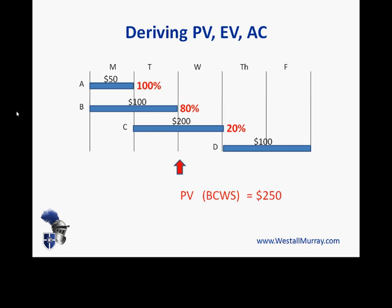Now let's say that, as a result of a progress report, we're told when we get to Tuesday this is what has actually happened. Activity A is indeed 100% complete, but we've only done 80% of Activity B, and only 20% of Activity C. So let's think about our Earned Value. We've completed Activity A, so we've earned $50. We've only done 80% of Activity B, so we've only earned $80 worth of work. Activity C is 20% complete, so we've only earned $40 worth of work. Our total Earned Value is $170.